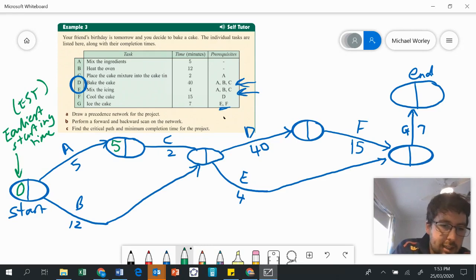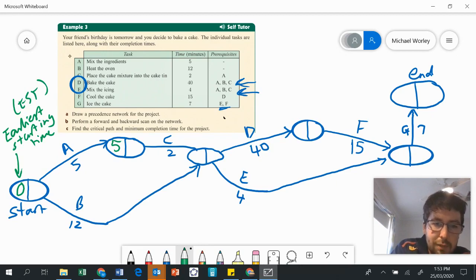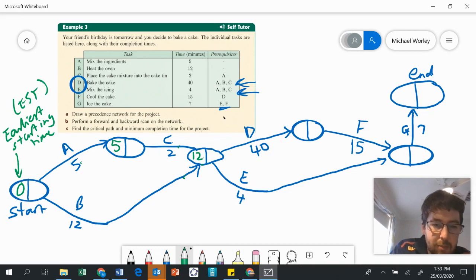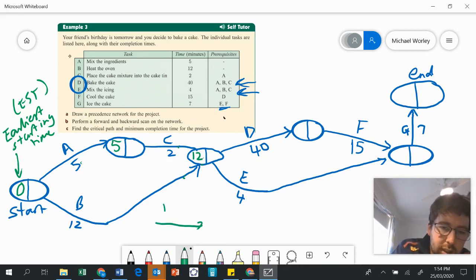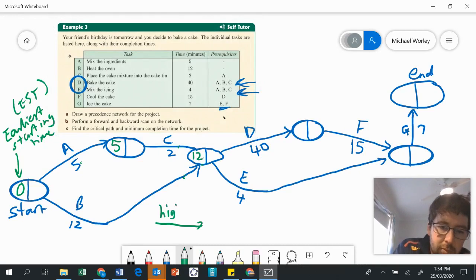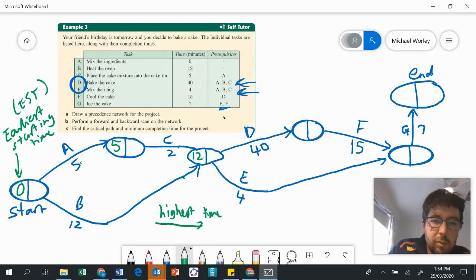Now looking at the B link: zero plus 12 is 12. But here, five plus two is seven. When we're doing our forward scan, we always do the bigger number, because the earliest that both C and B can be finished is at 12 minutes. Five plus two is seven, but because we are doing our earliest starting times, we want to do the bigger number. So when you're going left to right, use the higher number.